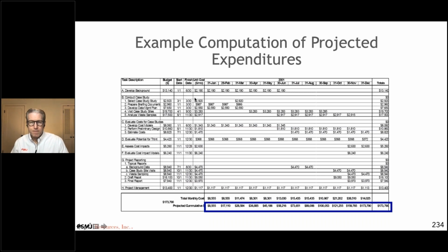I think from a realistic standpoint, yeah, because you might spend an entire week on something one month and then only spend a couple of hours the next or something. So I think that makes sense, because it's hard to pinpoint where exactly you're going to spend that time. And in terms of time, time is a precious resource to us, maybe the most valuable thing in this world. Why would you want to spend all your time trying to plan this curve out, this up and down, and when we're going to do this task and that task, rather than just divide it by 6, spread it out, and we say, hey, in January, how many things happen in January? 1, 2, 3, 4, 5, 6 things, right? If those 6 things happen, it's going to be about